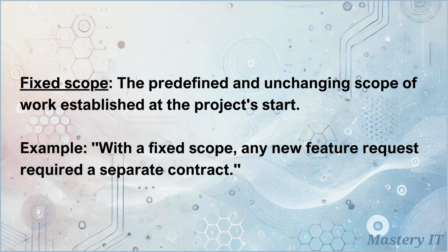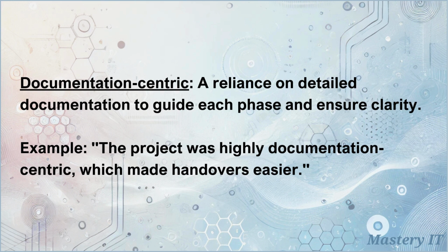Fixed scope, the predefined and unchanging scope of work established at the project's start. With a fixed scope, any new feature request required a separate contract. Documentation-centric, a reliance on detailed documentation to guide each phase and ensure clarity. The project was highly documentation-centric, which made handovers easier.